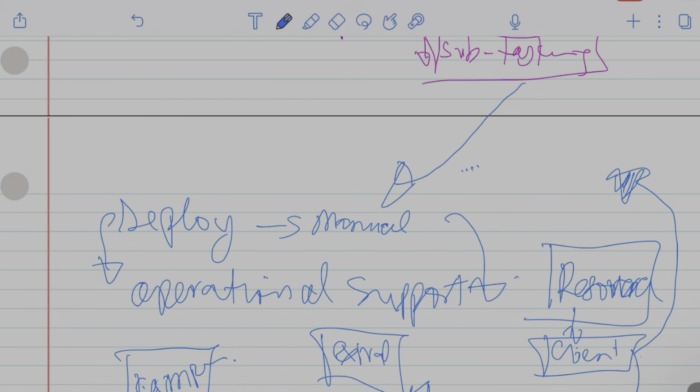Right. Now, in an environment where you want to say that you have been engaged in the process of release, you can now say, okay, I've actually taken part in release planning, and this is what we're looking at. We're looking at the product roadmap. We're looking at when the customer expects it, and then looking at the team capacity, how the stories have been broken down, the timeline to complete it, and we now assign a possible date that we can release it to our client.